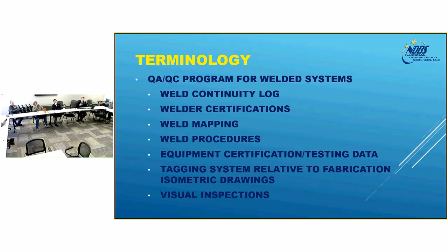So this is essentially a documented procedure for different sections of ASME code that require this. So these are code required documents that are included in the engineering turnover package, and they're also reviewed and approved by the owner while it's happening.